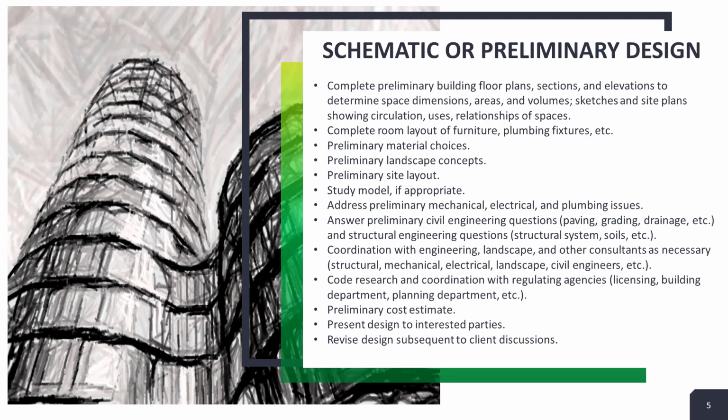Schematic design. Again, like I said, schematic or programming design, we spend a lot of time on this in both the residential and the commercial class. Again, this is typically based on the approved program. The schematic design synthesizes the program into a defined, feasible design. The design will be shown in the form of schematic drawings or preliminary drawings, and in some cases, even a study model. So again, with our 3D modeling software, we can begin to 3D model the project.